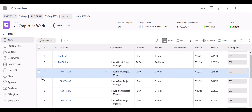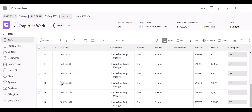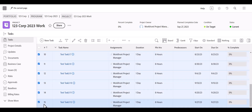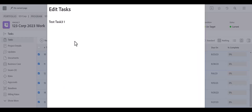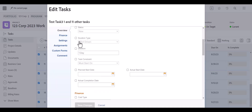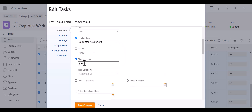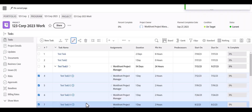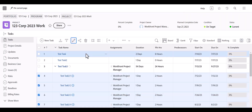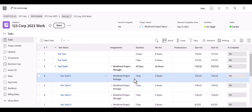You can also bulk select and update the planned hours accordingly. If you know it's only going to take the assigned user two hours, you can bulk select and update the duration type to Calculated Assignment, then change the planned hours to two hours so they're properly allocated for the amount of work.